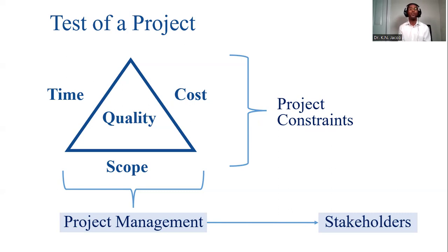Who are the stakeholders? Of course, the road contractor is a stakeholder. That's a primary stakeholder. This is the person building the road. Now, the suppliers of construction materials are stakeholders. Suppliers of services are stakeholders. Now, the procuring entity, maybe it is the state government of California. Also, who is going to do the road audits? The engineering firms that will do road audits to ascertain the value for money for that project.